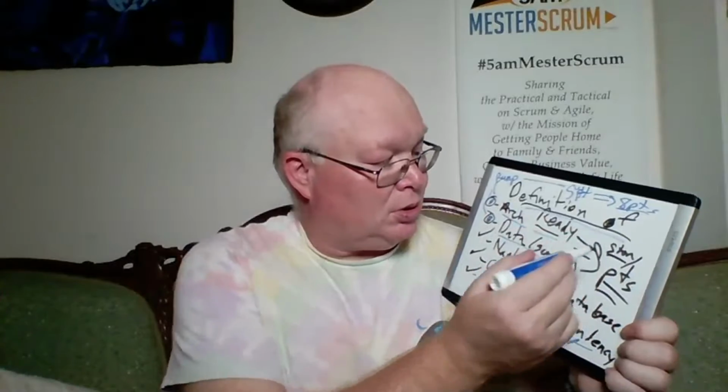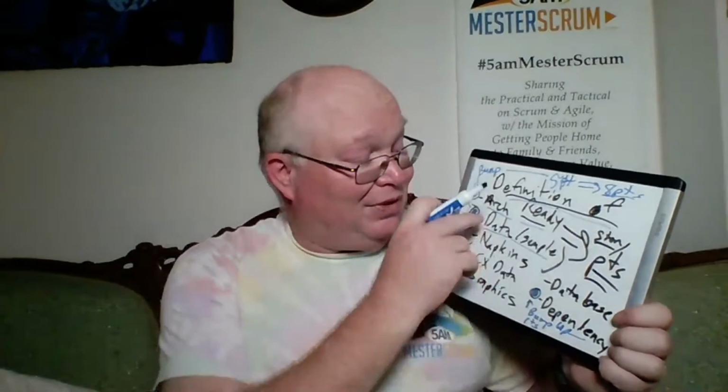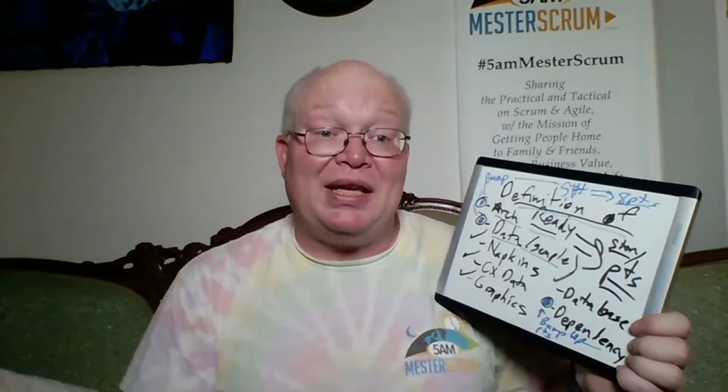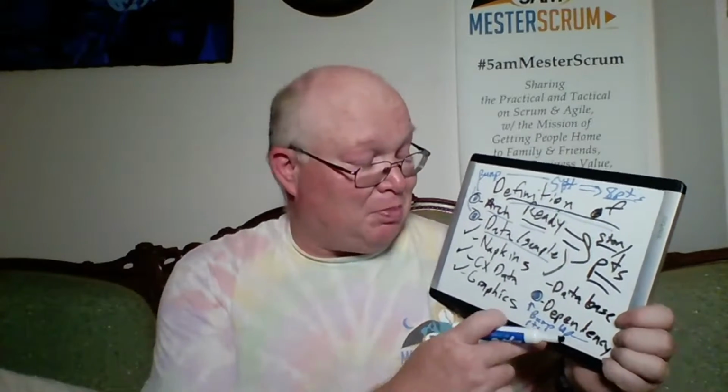So what does this do for you? This gives you leverage with the product owner a little bit too, because now your definition of ready helps you establish this stuff. It encourages the product owner to bring these things to the table because maybe you can get more work into a sprint. Without these couple things missing in your definition of ready, you have a legitimate reason why to bump it up, and you can't do as much work in the sprint because it's missing stuff to be ready, right? So using these, like I'm missing stuff on my definition of ready, therefore I'm going to bump up the story. And it's totally legit. I don't know where the lid is for this thing. Here it is. So it's a totally legit item.